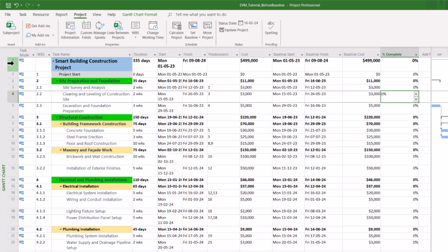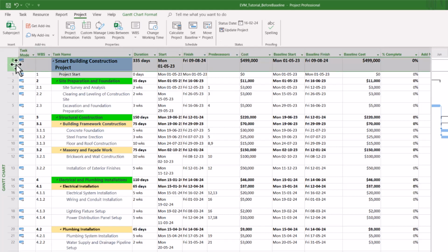So this task 0 here, you see this one, is called the summary task for the whole project. If you visualize the WBS, this would be the item at the top of the WBS, and we decompose this item into many levels of decomposition and then create work packages.